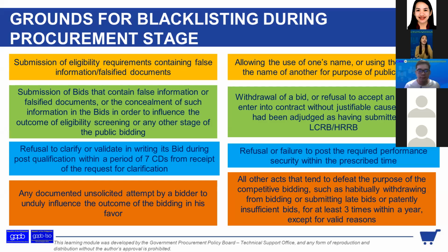Refusal to clarify or validate in writing its bid during post-qualification within a period of 7 calendar days from receipt of the request for clarification. That is a ground for blacklisting. Why? Because supposedly during post-qualification, they should cooperate well with the BAC para matapos na yung, ma-declare na sila na LCRB if once kompleto na yung proof nila. No? So if they refuse, then that is a ground for blacklisting. May bid security pa na pwedeng makuha. That is if without justifiable reason.